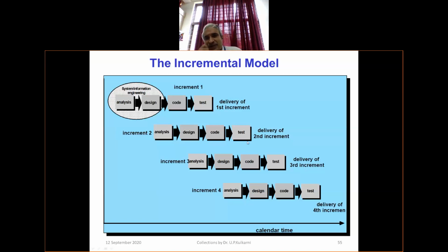So if I'm an evaluator, I ask you to pick a particular project, and then ask what the different functionalities in that are. Every functionality could be an increment. Functionalities are nothing but use cases. Use cases are nothing but the functionality of the system, and that makes the whole system. Pick every use case, develop it. Pick a second use case, develop it, and try to integrate and resolve it. That's how the iterative process gets into the incremental model that we are thinking about.